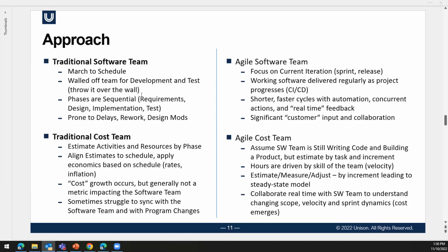if an iteration is not the same every time. The common thing is I might do a 3 calendar week sprint, so that assumes 15 calendar days. But if it's at Christmas, I've got 3 calendar days that are not going to be worked. I've got a team that varies from 3 to 6. They're available sometimes up to 60%, but that may vary. The number of hours they're actually working on dev versus ops varies. Do you adjust when it's story points per sprint? That assumes you've got objective or repeatable story points, which I get from a team that can be reliable. But when you say per sprint, if that's a variable content of the available hours, are you adjusting for that when you're figuring out how many story points you can put into a future sprint?